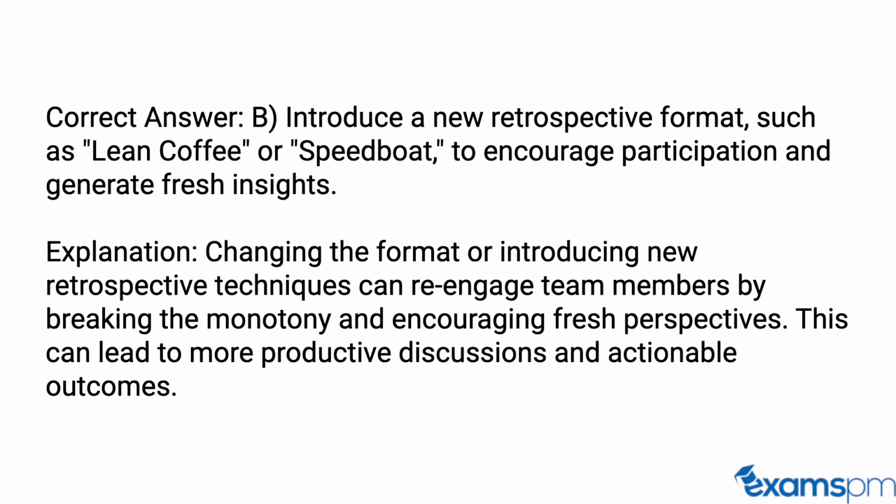Correct answer. B. Introduce a new retrospective format, such as lean coffee or speedboat, to encourage participation and generate fresh insights. Explanation. Changing the format or introducing new retrospective techniques can re-engage team members by breaking the monotony and encouraging fresh perspectives. This can lead to more productive discussions and actionable outcomes.